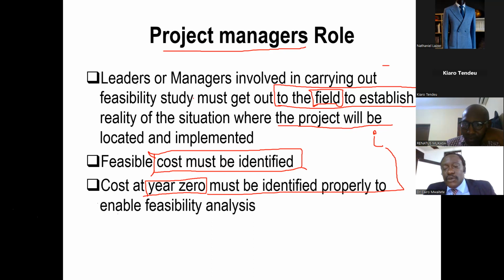As a market value. So for you as a project manager, we say you must be different. Your costs, you must go to the field. You must assess. You must measure exactly. Even if somebody has computed for you as a manager, you must go to the field and assess by yourself. You must be conversant, and you must own those costs because you'll be responsible for making payments. It should not come to the point where you say, with these costs, I didn't know. So you see, that's the challenge. You'll find many projects are going with variations just because of those kinds of things. Understood?